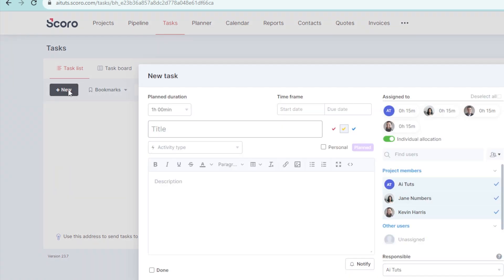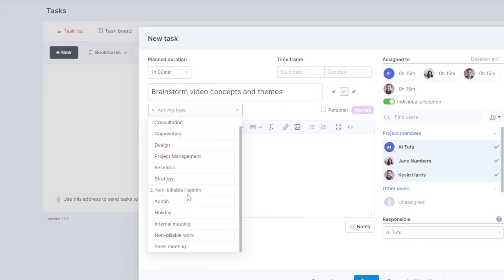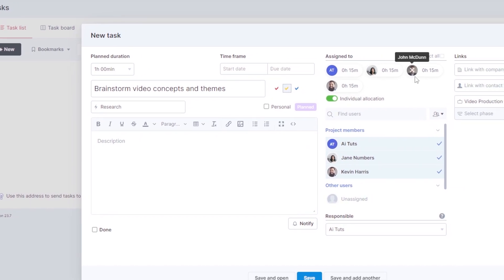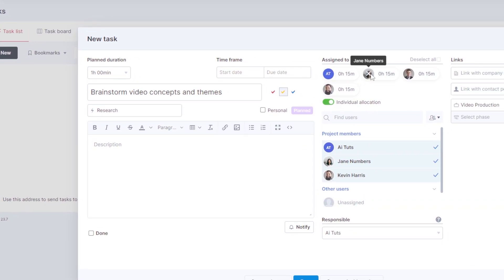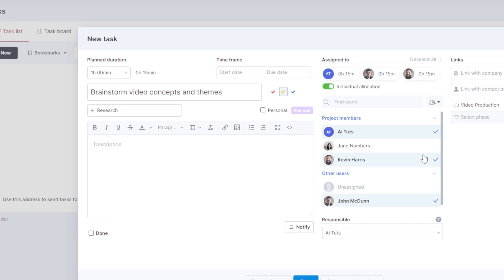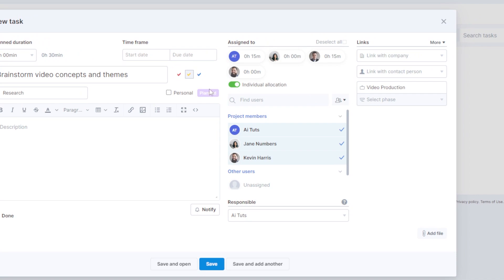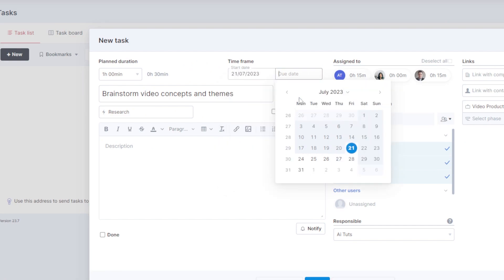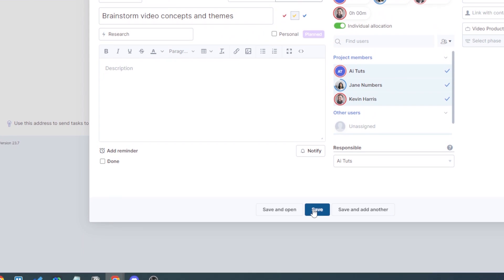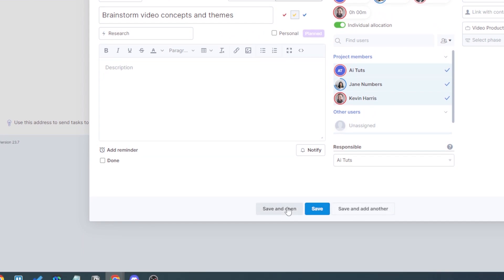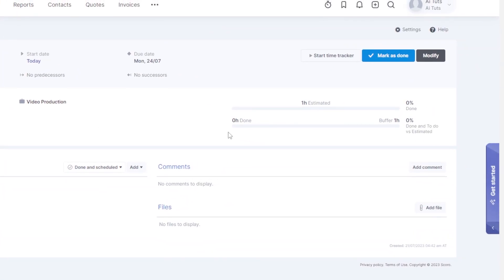Click new to add a task. For example, create a task called 'Brainstorm Video Concepts and Themes'. Select the activity type — for example, research. You can see all assignments and remove members if needed. Add a phase if applicable, set the start date to today and the due date to Monday, then click 'Save and Open' to view the task detail, or 'Save and Add Another' to keep adding.